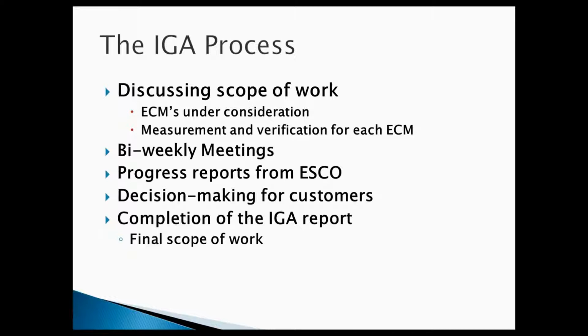Because of the expense, it's also important to carefully review the IGA agreement. Not only will it clarify the responsibilities when it comes to funding for the IGA, it should also reflect an agreement on what ECMs are ultimately going to be developed. You don't want to be in a position spending money developing and engineering measures that will not ultimately be included in the final project.